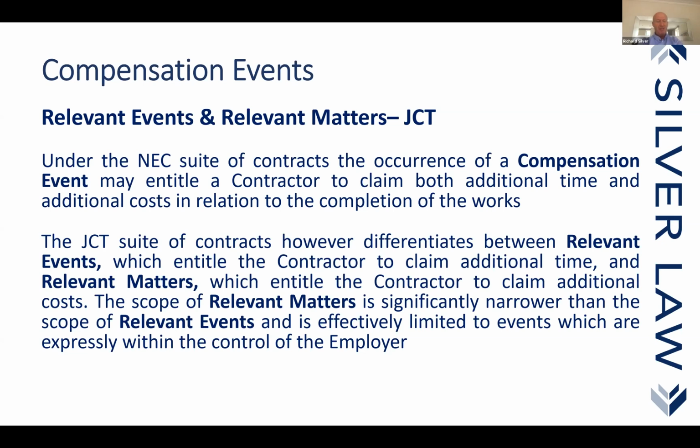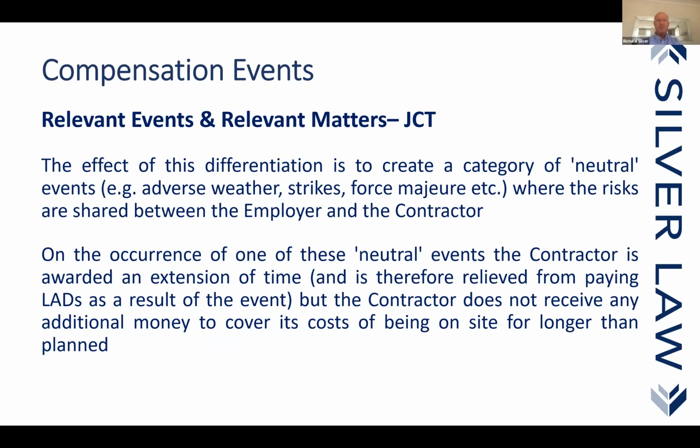We then have relevant events. And under the JCT, we have relevant events and relevant matters. And let me just really impress upon people these two clauses are not linked. Quite often people think because many of the relevant matters mirror the relevant events, they are linked, these clauses, but they're not. So you should be dealing with these clauses separately. So if you're issuing a notice under a relevant event, that's under one clause. You must issue a separate notice under the relevant matter.